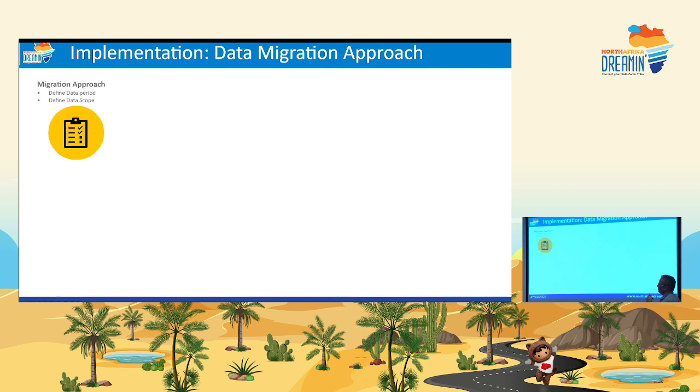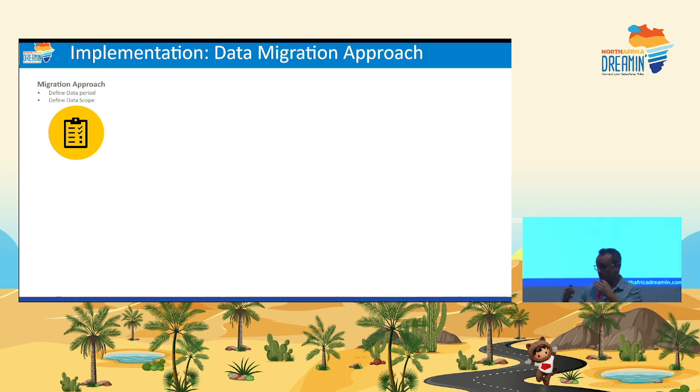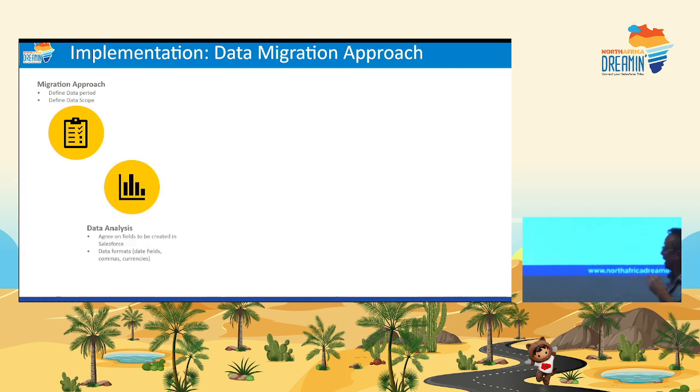So something very important when it comes to data is, you need to identify what part of your data needs to be migrated before the implementation or after the implementation. But there's also data that has a different scope, and you need to have it migrated on a regular basis, so you need to schedule it while the project is already alive.